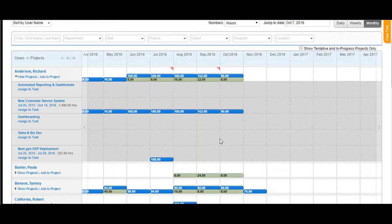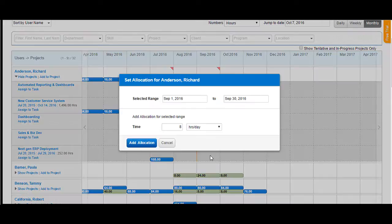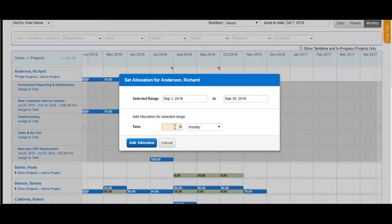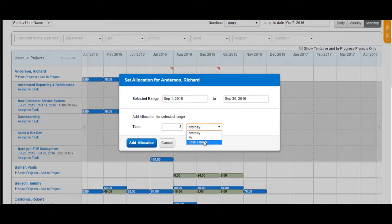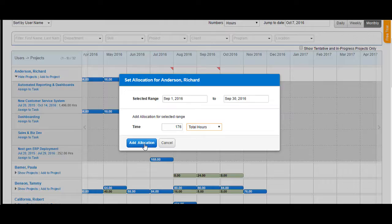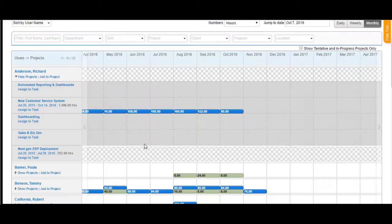To allocate a resource, click on a cell available here and you would see a popup coming up. Select the range and then select the time that you would like to allocate as hours per day, as a percentage, or total hours. When I select total hours, you can assign a total number of hours and the system would divide the number of hours by month, by week, or daily as per the specified view.